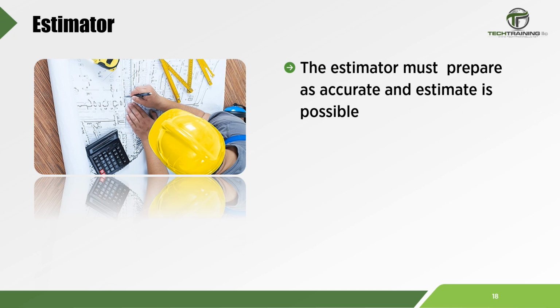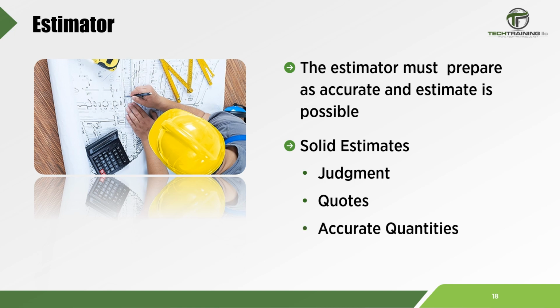Since subcontractors and specialty contractors perform much of the work in the field, an estimator must be able to calculate the scope of work in order to get accurate quotes from the subcontracting firms. Solid estimates require organization and estimator's judgment, subcontractor quotes, accurate quantity takeoffs, and accurate data of completed projects, also known as historical data.